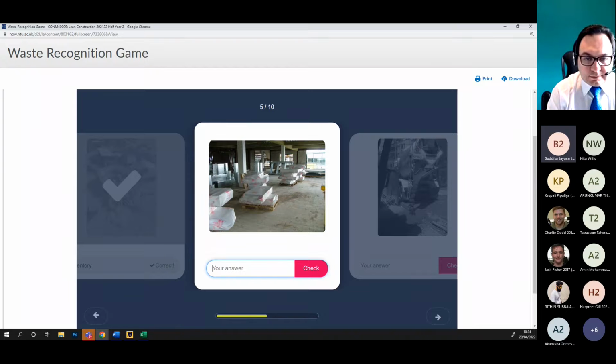It was on the ground floor and it was kept there for a long time until the upper floors were ready, and it will get damaged while it's on the ground floor. So the places are occupied, can't do anything in there. They can't carry on the work belonging to the ground floor because the stock is there. Oh yeah, this is the waiting.